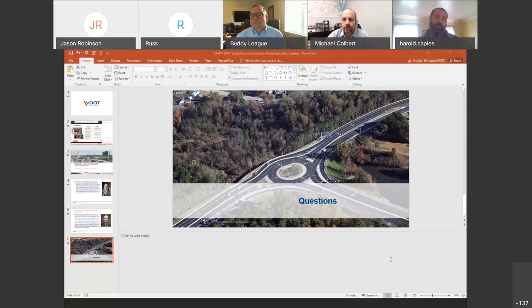That helps on a number of fronts. I don't know that the prime contractors necessarily use it, from a maneuvering standpoint, to see who's doing what. But it is one of the things that both the prime and subcontractors utilize heavily, from the standpoint of who they're going to be working with, subcontracting with, DBE participation, among other things. So it's a resounding yes. We have a plan holders list. It gets updated once a week, so it's a running list that continually gets updated until bid letting.